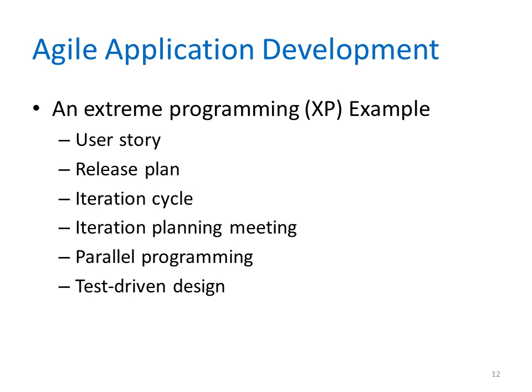In extreme programming, the customer begins by meeting with the programmers and providing user stories. A user story is a short, simple requirements definition. Programmers use user stories to determine the project's requirements, priorities, and scope. User stories do not deal with technical details, and they're short and they're often written on index cards. Each user story is given a priority by the customer so the requirements can be ranked. Programmers assign a score to each story that indicates the estimated difficulty of implementation.